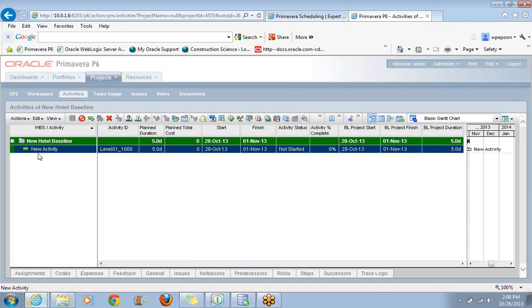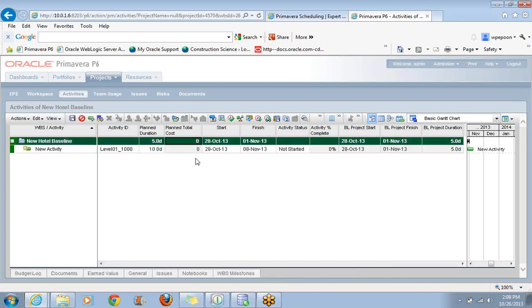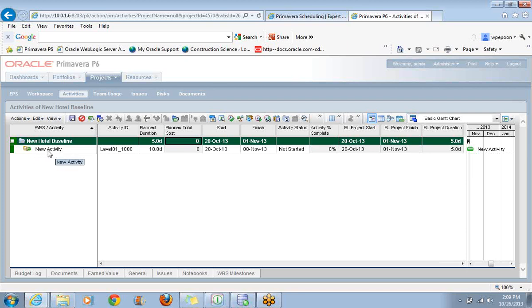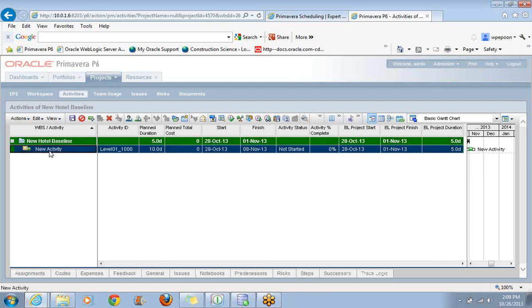I've noticed that several of the default layouts, or what we now call views in P6 Web, don't bother including the activity ID. So there's our ID. There's that prefix that I set up. What we're going to do now is modify this activity from its current duration of five days. I'm going to make it ten days. I don't have to type in the D. But what I want to show you here is that the moment I took an existing activity and modified it, notice that we now have the asterisk with the yellow background.